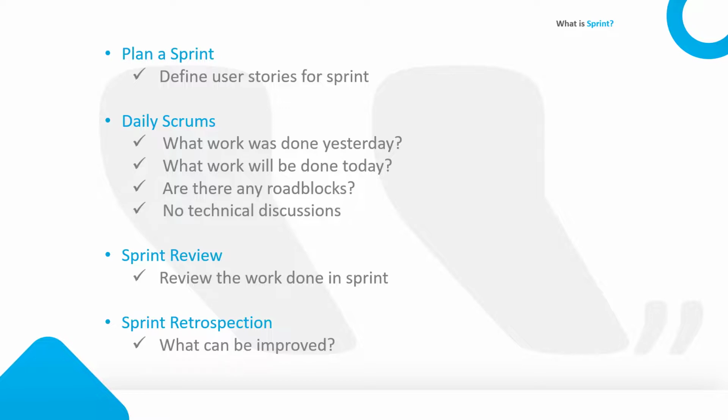Like I said before, a sprint is a cycle and it continues. So there is sprint 1, after 2 weeks it will be sprint 2, sprint 3, sprint 4, and on and on. The goal of a sprint is that in 2 weeks, we have X amount of work that we want to develop and deliver. That way, business does not have to wait a long time before some change is pushed on the website, and it is continuous development.